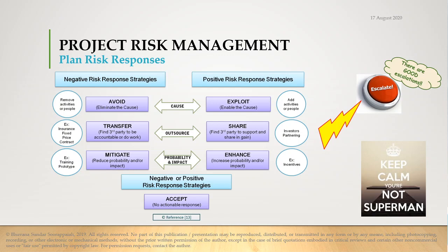These are the triggers. Or one of your team members starts taking lots of leaves and you hear from other team members, hey, actually maybe he's looking for a job, he's going for job interviews. So already you put it in a watch list. There's a chance person X will resign because he or she is not happy with the incentives, with on-site opportunities, with challenging tasks. But you're not going to show it to the management, you're going to put it in the watch list. But imagine a trigger, lots of leaves, you know that he's seriously looking for another job. That's a trigger, you will move it to the main risk register. So these are some ways how you can actively or passively accept risks.